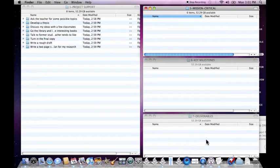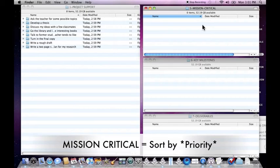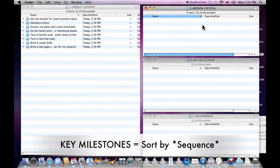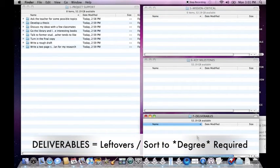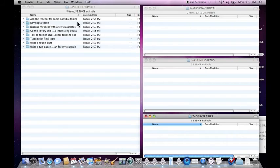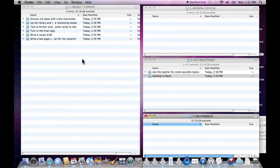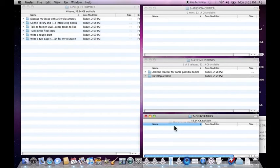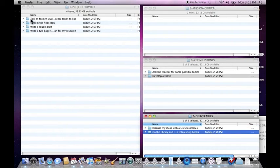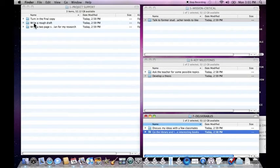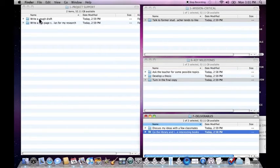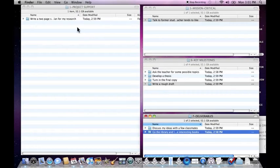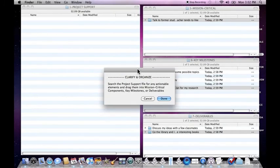Mission critical, key milestones and deliverables serve as categories for dividing these actions. Each one of these folders is based on how you sequence or order the items. Mission critical has to do with sorting items by priority. Key milestones has to do with sorting items by sequence, things that are dependent on others. You have to finish this first before this happens. And deliverables is pretty much anything that's left over and can be sorted however you want. So ask the teacher for some possible topics, that's something we'll need to do first. Develop a thesis, that will come later. That's part of the sequence. Discuss my ideas with classmates, I can do that right now. I'll just throw that in deliverables. Talk to former students about what the teacher likes, I want to get an A on this, so this is critical. Turn in the final copy, that's part of the sequence. Write a rough draft, it's part of the sequence. Write a two-page summary, that's part of the sequence. So we've got everything out and we'll click done.